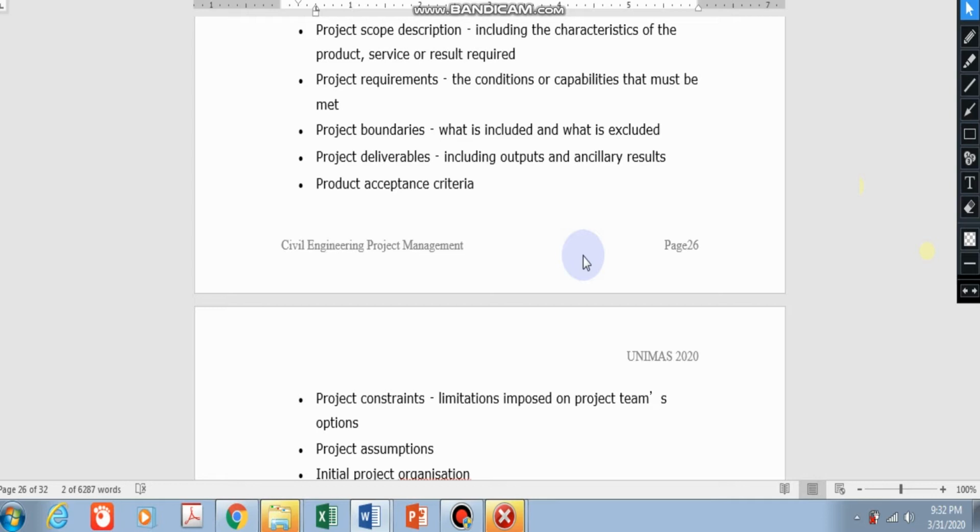If you don't want to do your value engineering, you still can delay this bit, but it is good to do it earlier so that you can see whether you can reduce some of the items in terms of the mechanical parts, or buy a high performance part but save on operation later and improve efficiency. Do you want to do it with 3 pumps, or do you want to do it with 1 pump? So there is a bit of difference here and there. So this is a time that you want to study whether if you change any component of your idea, it would actually make it better value.